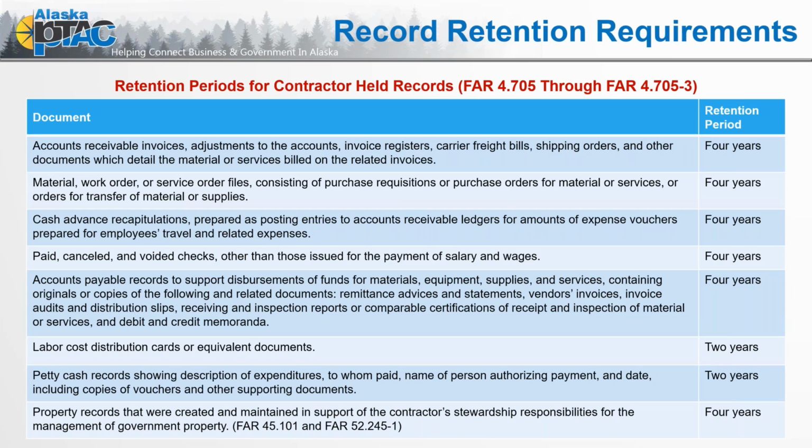The only thing I didn't really get a chance to do is go in on all these labor, when we're talking about payroll, and make sure that the record retention period required in the FAR also matches the Department of Labor's requirement for maintaining wage records. Look at that, and if DOL is requiring that you keep those records longer than what's listed, then that's what you should implement for your record retention process.